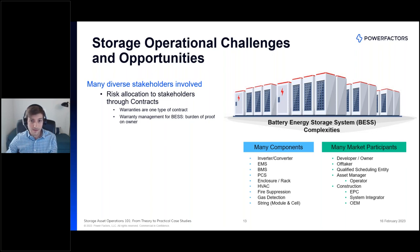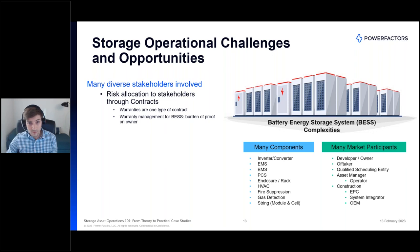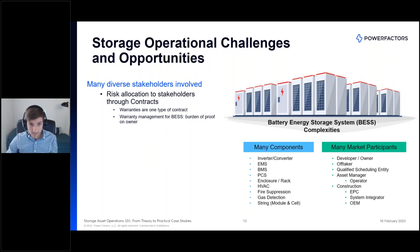Risk is best allocated to stakeholders through contracts, which, if done well, allocate risk to the party best equipped to control it. EPC warranties are one such type of contract. The golden rule of BESS — battery energy storage systems — operations is this: don't void your warranty. If you do find yourself needing to levy a warranty claim, the burden of proof is on the owner and the operator to prove that operations for the entire life of the system were within the bounds of the warranty operating envelope. It's quite a burden and it means you need to control your data.